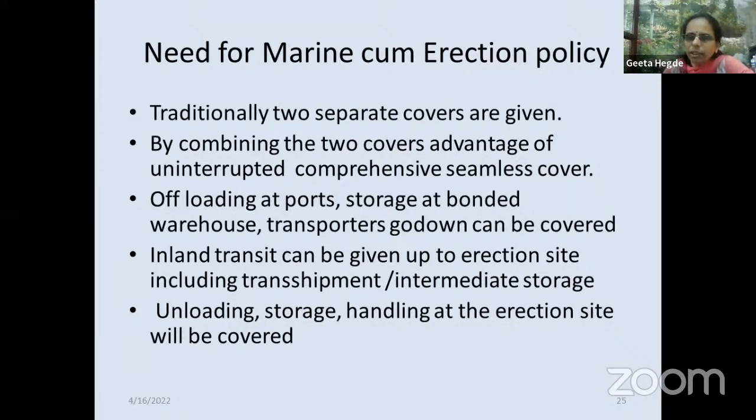Any storage in between can also be covered. Otherwise, in case of marine, the terms and conditions will be different. Once it is unloaded, the cover will end. Then where does the erection start and when does the marine end? This little gap will not be there if we give a continuous cover of marine cum erection. If there are two different insurers of marine and erection, then where the loss is falling will be a matter of doubt. It will be more convenient if you give a marine cum erection policy.